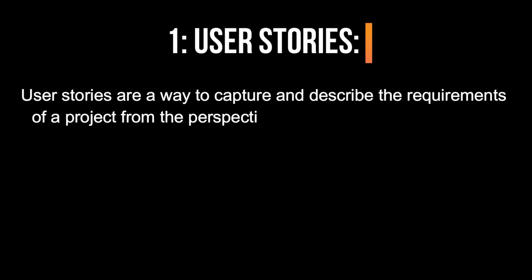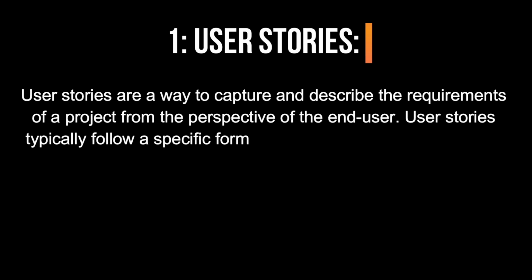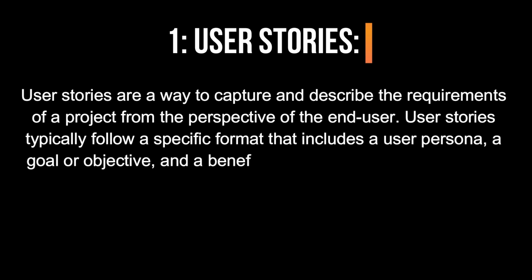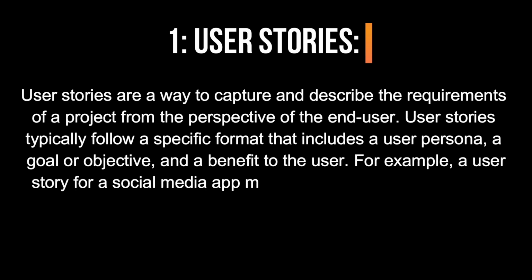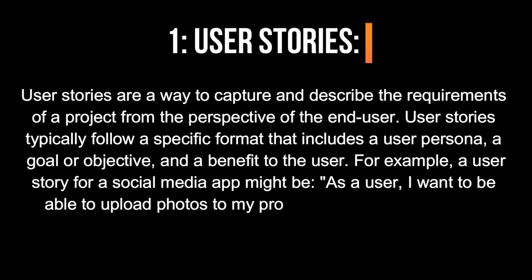of the end user. User stories typically follow a specific format that includes a user persona, a goal or objective, and a benefit to the user. For example, a user story for a social media app might be, as a user, I want to be able to upload photos to my profile so that I can share my experiences with my friends.